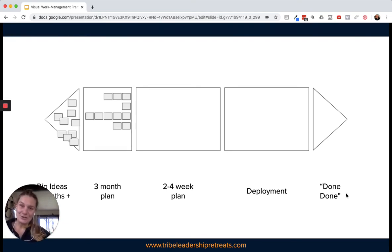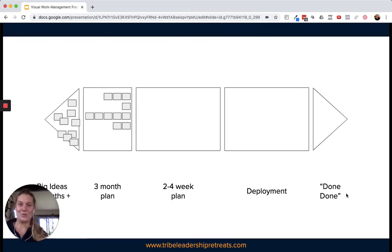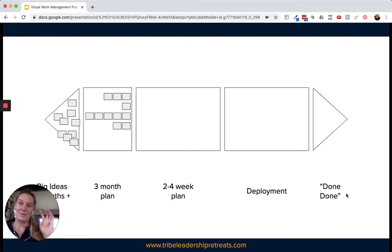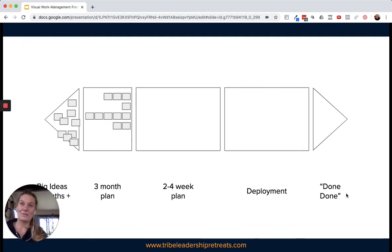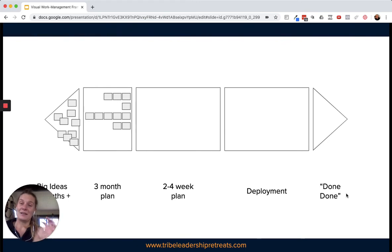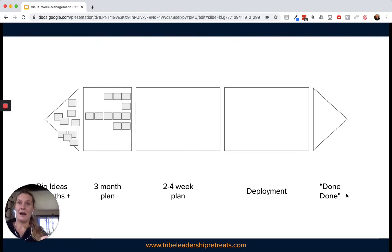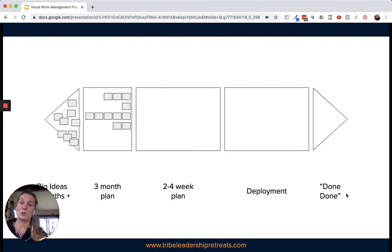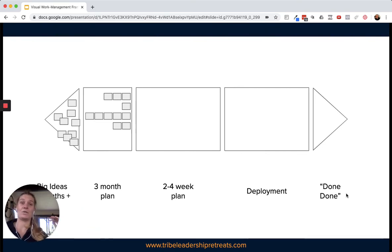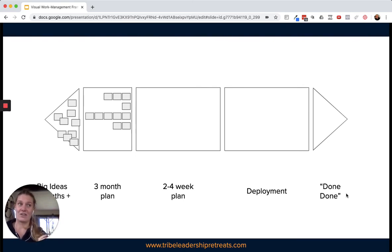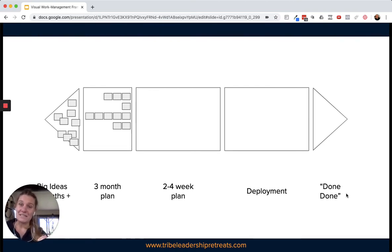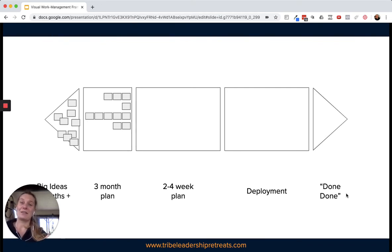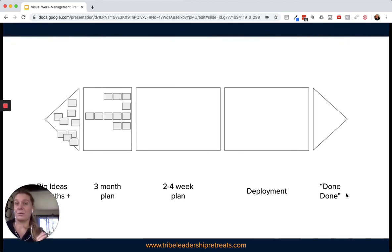As we move along the wall, the three-month plan, we framed up what the quarterly plan looked like. At this point, we've gone from an idea and somebody, usually a few people, have spent some time to validate whether or not that's an opportunity we want to go ahead with. Once that's happened, pieces of work started to fall into the three-month plan. We prioritized them based on which particular areas we were focusing on. I've drawn it in the diagram as swim lanes. If you've got a program heading off multiple different strategic features or pillars, you can start to see where you're having an impact against that higher-level set of governing principles.